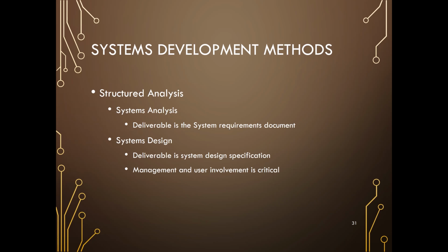So one good thing is that for system design, in some projects, when the designers finish designing a small part or small function, they let the management or the users see it and confirm that functionality, whether it's okay or not and whether we need any adjustment. If they are okay, then you realize the style of that kind of system already. Then when you have to design the next function, you know already that when you design this kind of thing, it should be okay or not okay. Right.